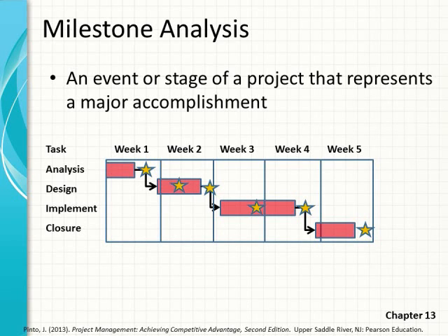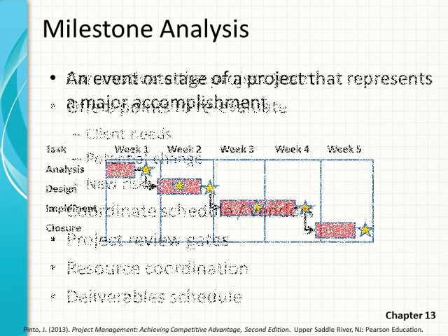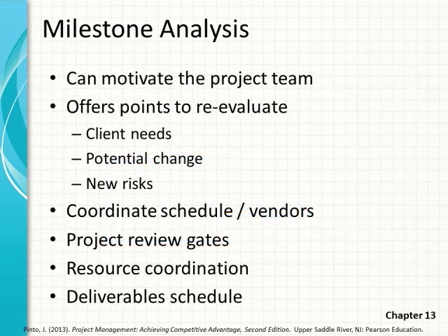We can select milestones at the end of phases or activities, but there's no need to. We can pick milestones anywhere within our project schedule where it makes sense to mark a completion or progress against a particular activity. Milestone analysis comes with a number of different benefits.